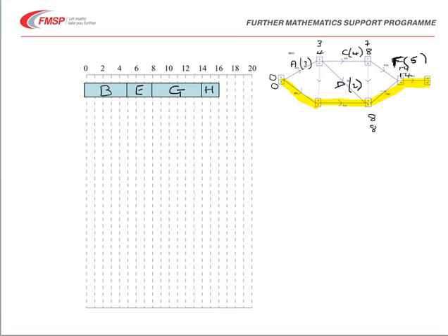So looking at event A now, we can see that it has to start off at 0. It has got length 3, so let's mark that in. But it can finish as late as 4. So there's a float time in here, what's called a float of 1 hour. And that's usually indicated by a little sort of stick on the end. Sometimes it's dotted. As long as you have some way of showing the float that's available to that activity. So we go through these now one at a time.